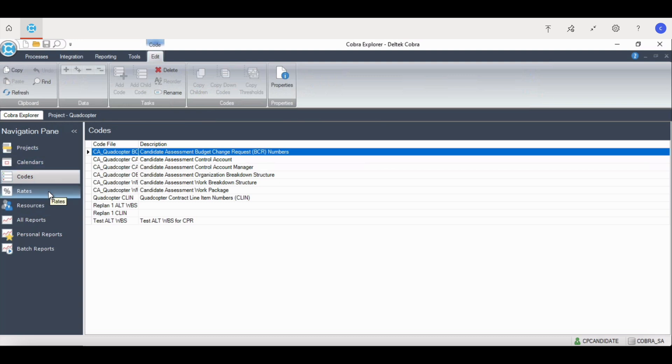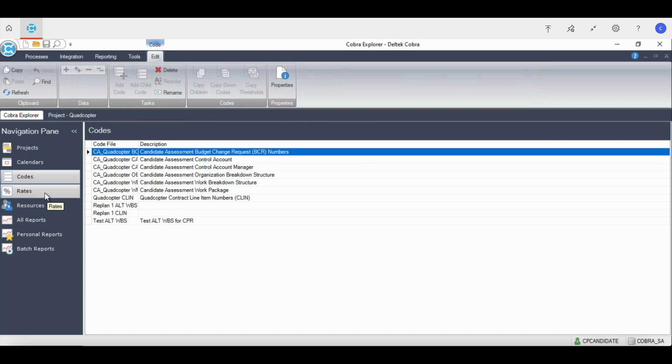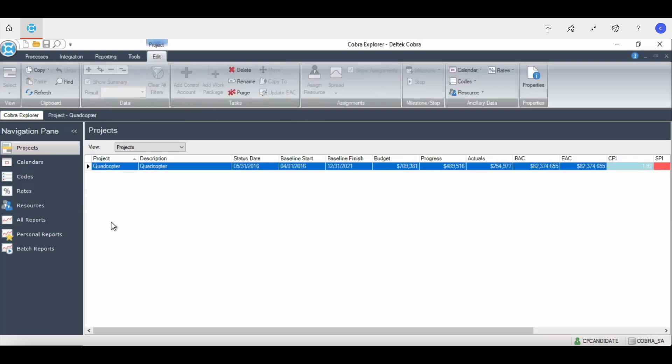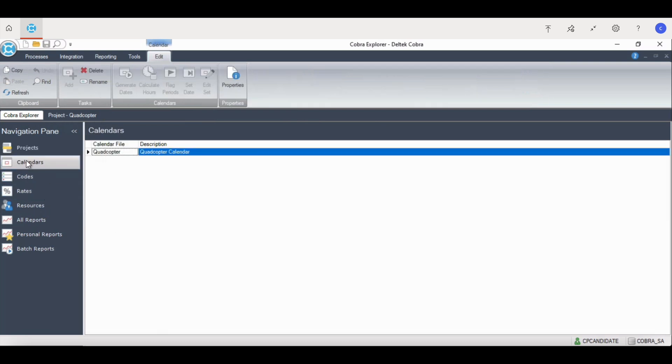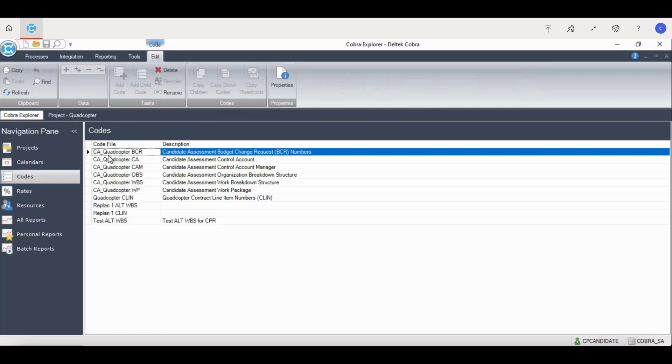All files can be linked to multiple projects, but it is recommended each project have its own calendar. We can navigate through each one of these. When I click on calendars, these are the calendars I have access to. These are the codes that the Quadcopter project uses: OBS, BCR, Control Account, Control Account Manager, CLIN, OBS, WBS, and Work Package.